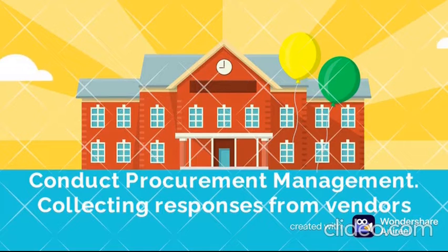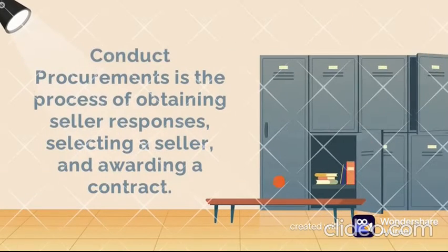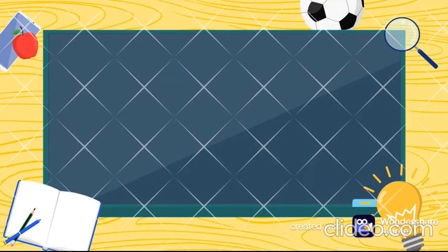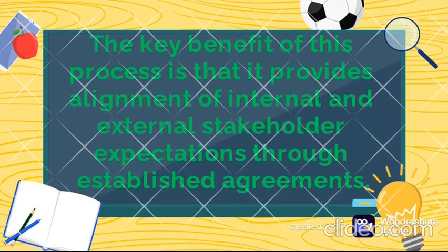Conduct procurement management, collecting responses from vendors. Conduct procurements is the process of obtaining seller responses, selecting a seller, and awarding a contract. The key benefit of this process is that it provides alignment of internal and external stakeholder expectations through established agreements.